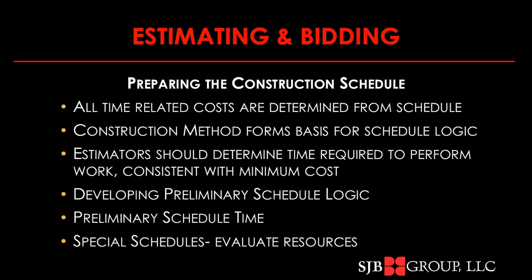Your schedule needs to consider weather restrictions and hazardous work items. Your schedule may need adjustment for limited access to and from the job site. That's especially critical in situations like airports, where getting in and out of the gate is very controlled.